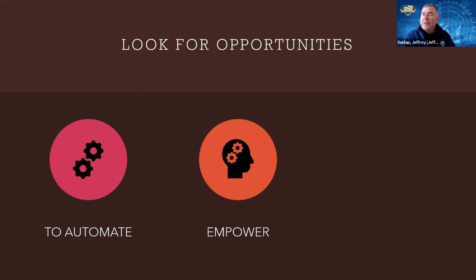So, let me put the way back dial on you folks here. Cost plus incentive basically says, what do we think the cost is going to be? That's the target. The contractor agrees, the government agrees, so that's the target. If you can come in less than that, your profit increases up to a certain point. So if you can do it more efficiently, save us money, we share the benefits, and you get more profit. That sounds like a pretty good incentive. The other end of that line is if you go over cost, then you get less profit, up to a minimum. So we're incentivizing them to control cost.